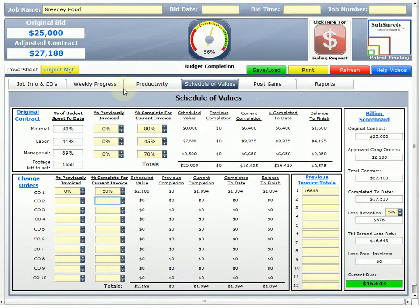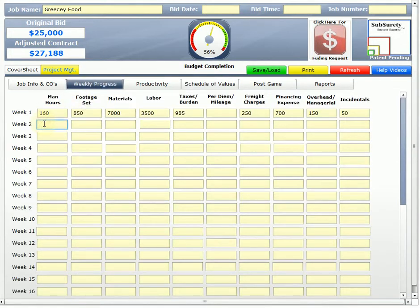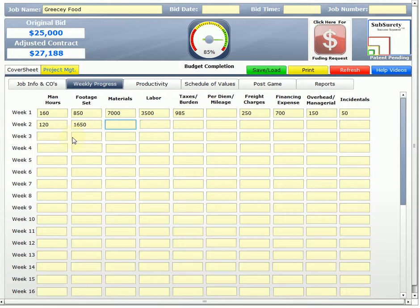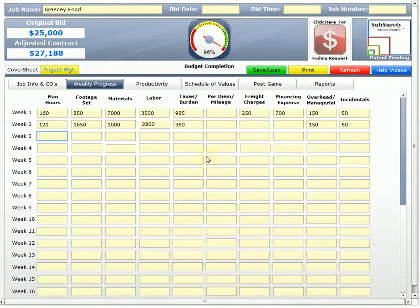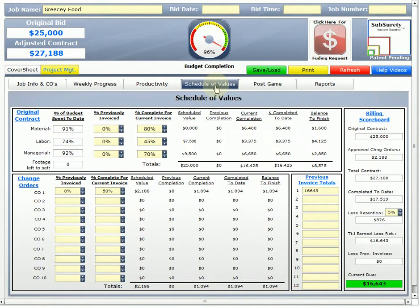So, let's say that we go to the next week. Let's say that we're billing weekly, just for purposes of this training. The next week, next billing period, I want to come in, and I want to enter information. Let's say that I did 120 hours. We did the hard work in the first billing period. We're going to finish it up now. 1650, I think, is what we had left to set. Materials, let's say that we had an additional 1,000. Labor, 2,800. 350 in taxes. No financing expense, we'll say 150 in 50. Those are our expenses and numbers for the next billing period. If we go to schedule values, now we can see that I'm at 91% of my budget, 74% of my labor, 92% of my managerial. But I have zero left to set.